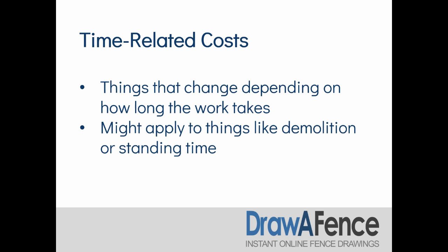A lot of bigger contracts in the fence world also do include day work rates. So your client will ask you specifically for rates for different kinds of labor, rates for different kinds of equipment, particular types of work that you're going to be doing. And this is so that they can set those things up beforehand so that if you have to do any of that work incidental to the main scope of work, they have something to refer back to when you claim those on your progress billing. So you might be asked to give those time-related costs. It's not always a requirement, but sometimes it is asked on especially bigger jobs.